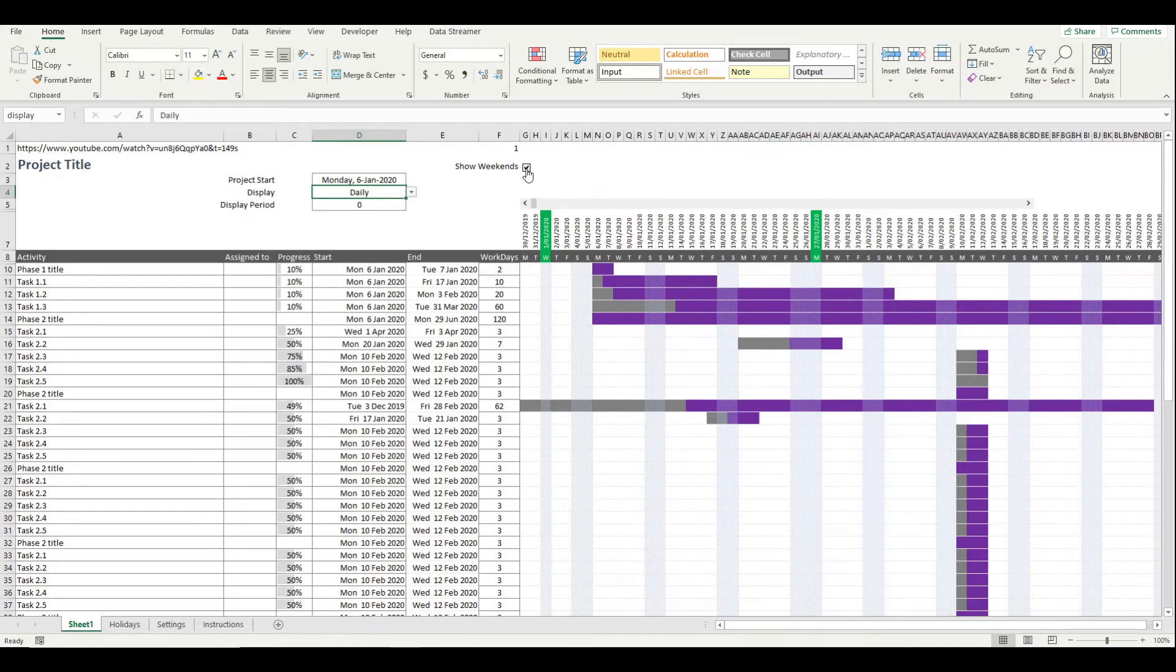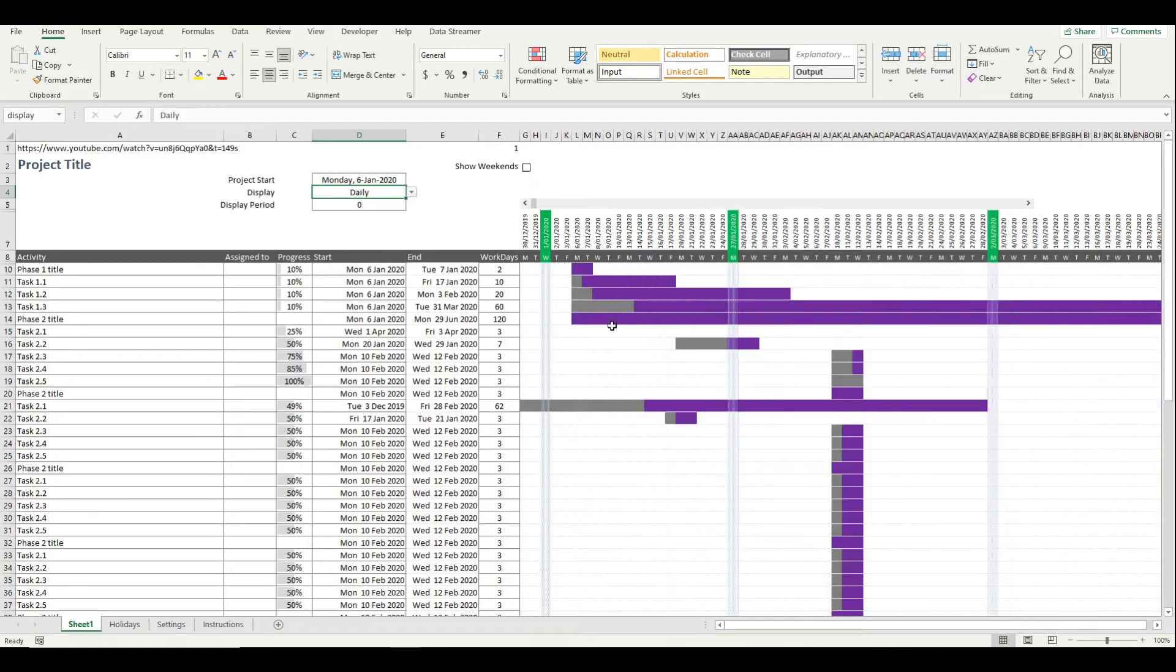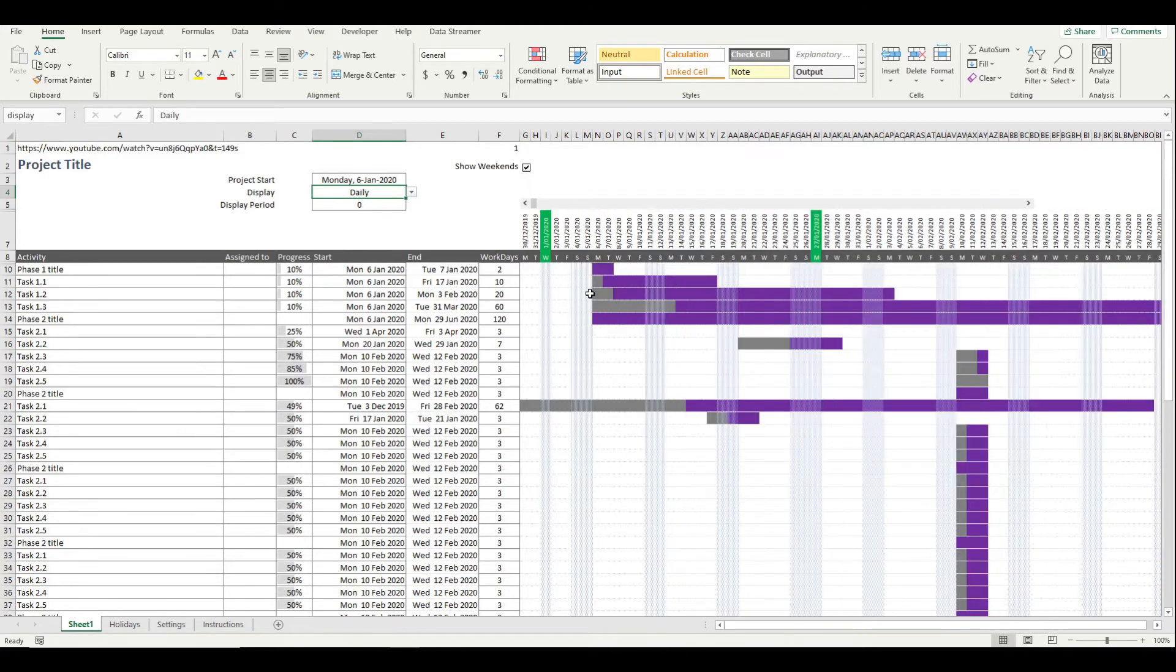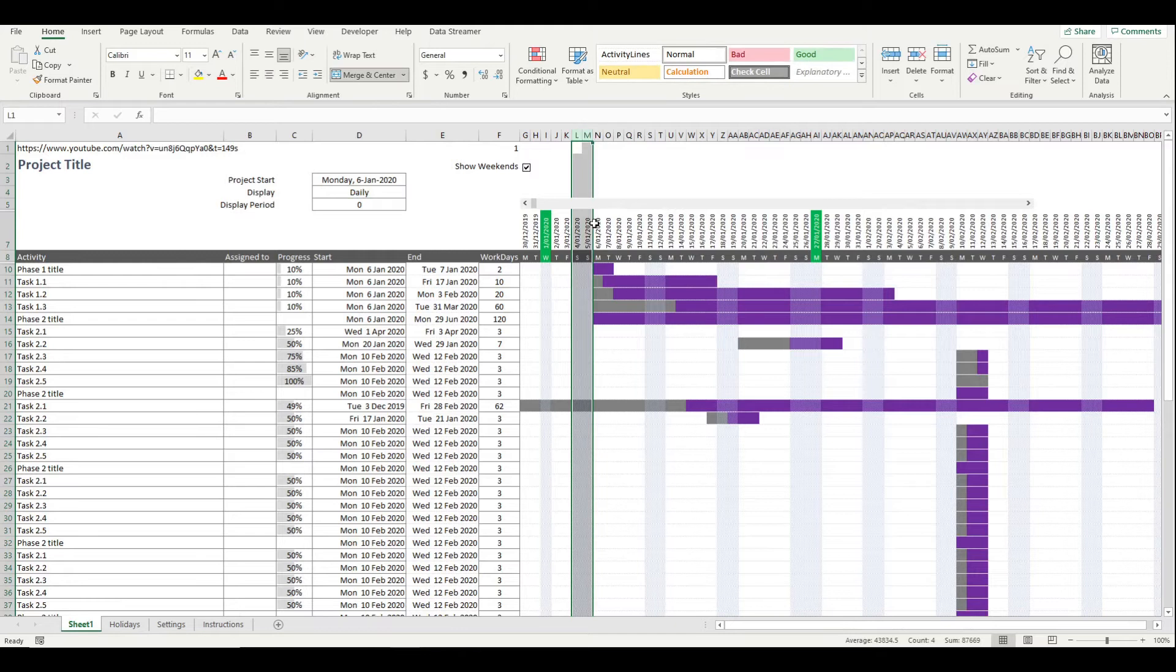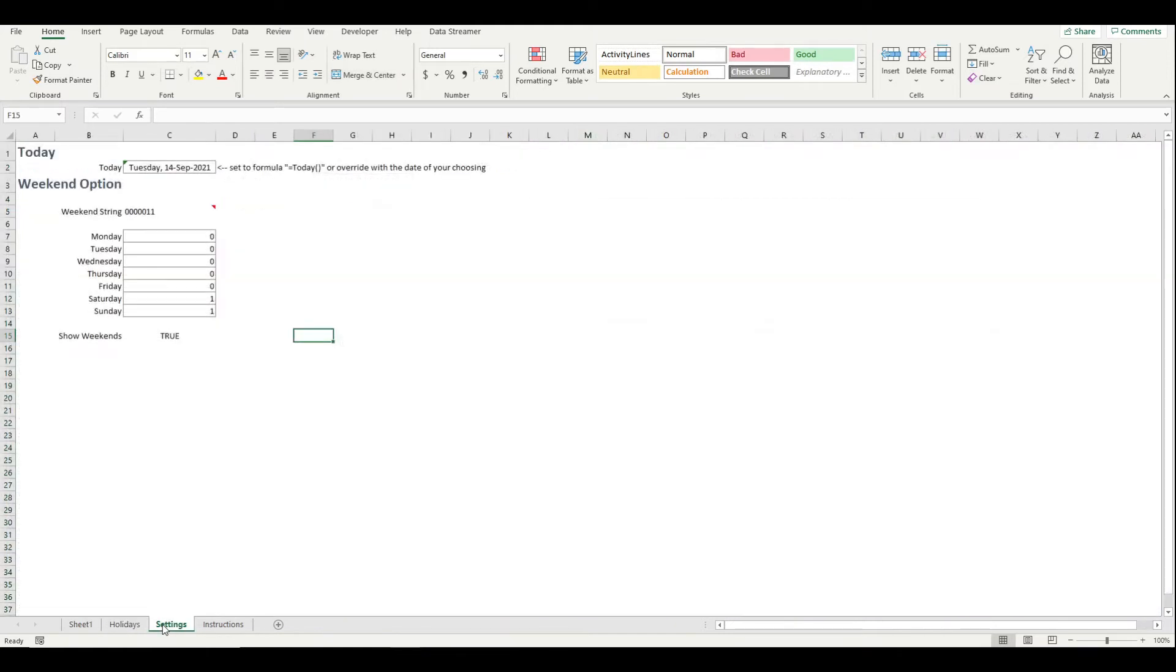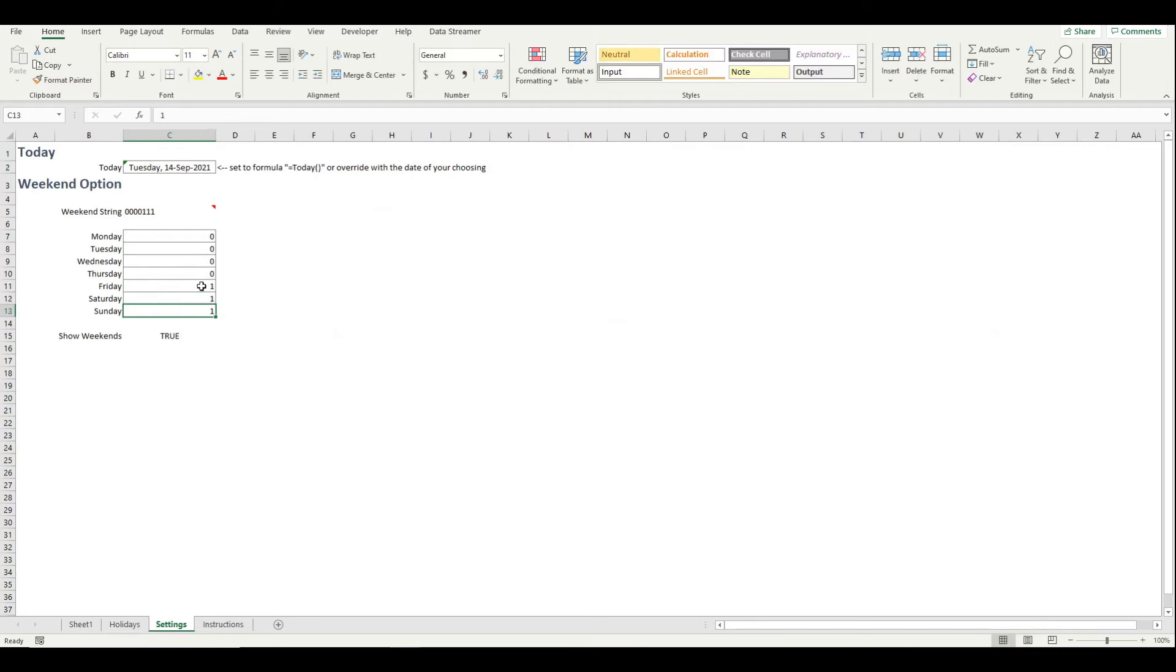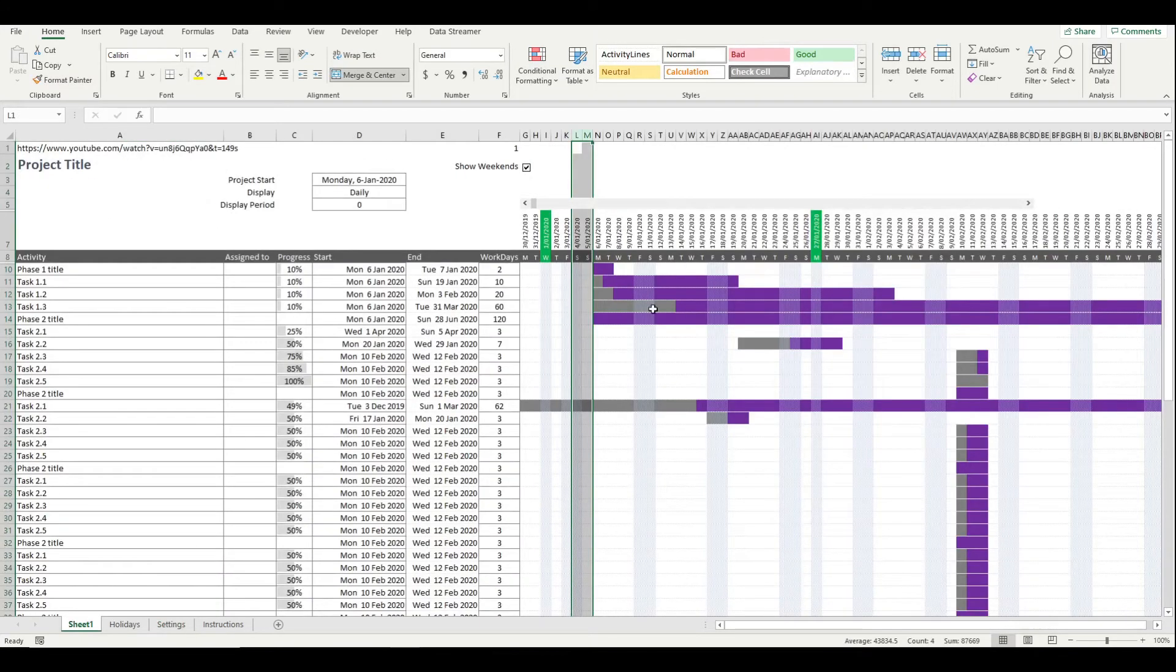You have the ability to set what days are weekends and then it will show bars for the weekend, and in the settings you can choose which days are the weekends. So if Friday was your weekend instead of Saturday and Sunday you can adjust and those weekend markers will move.